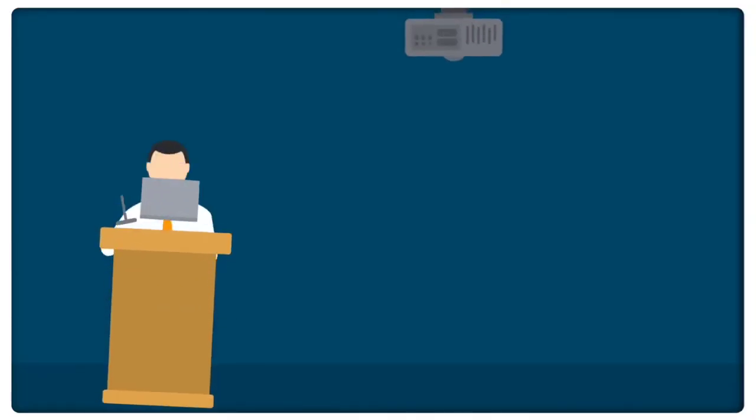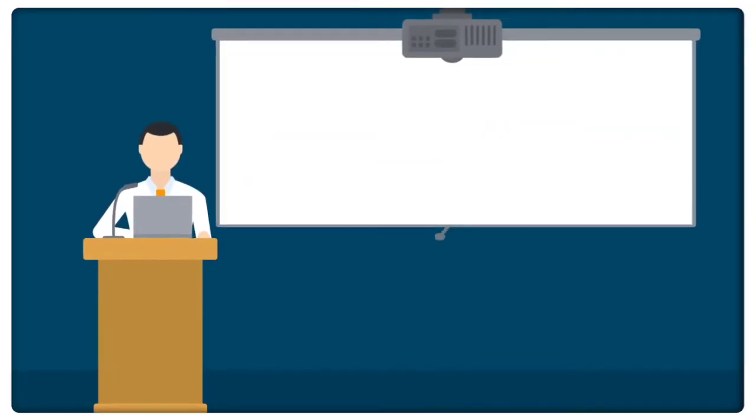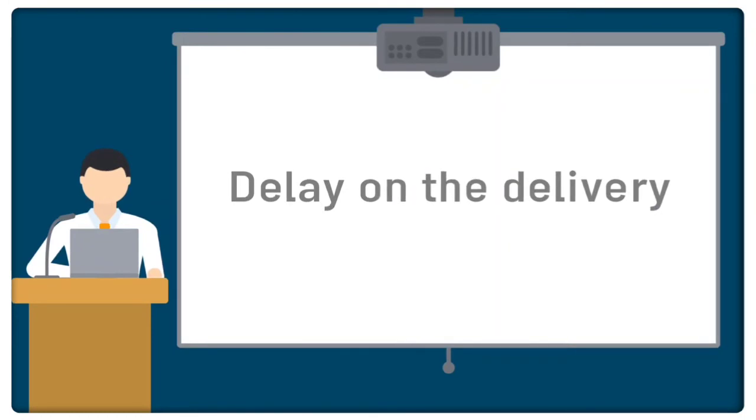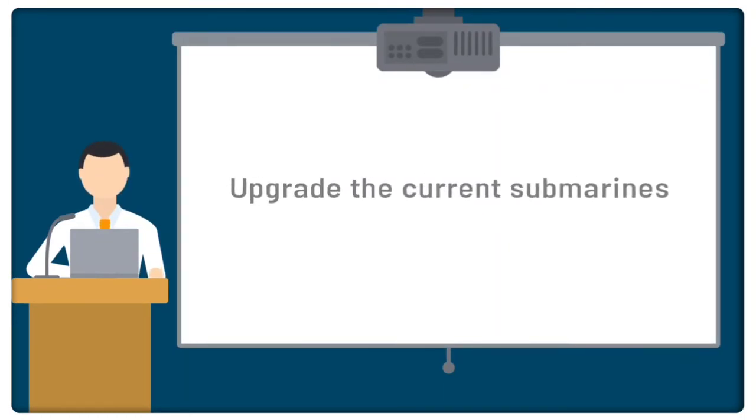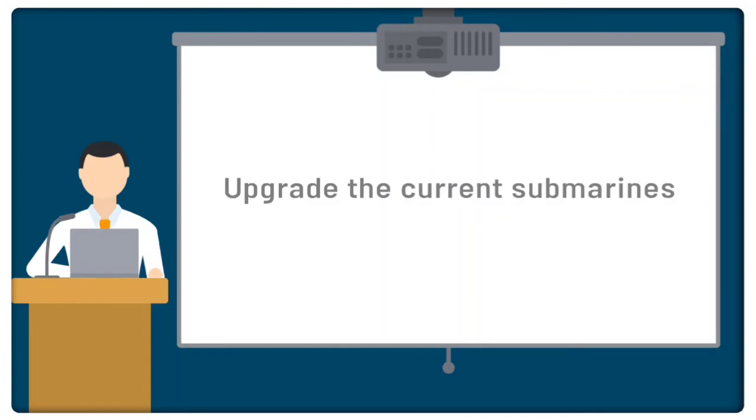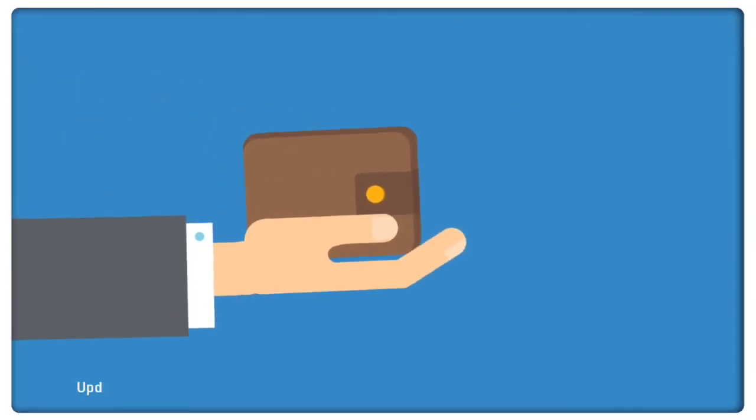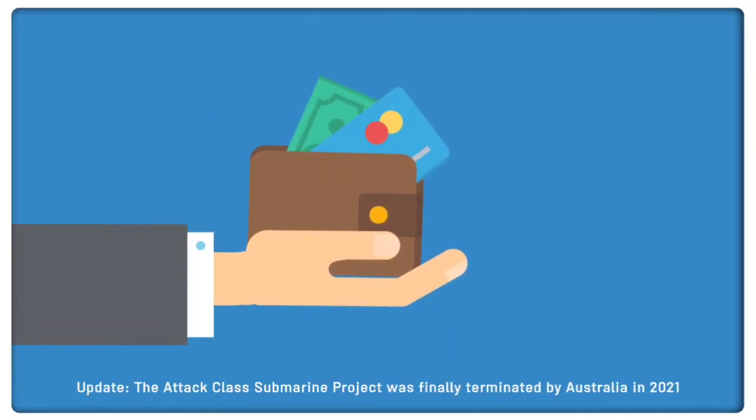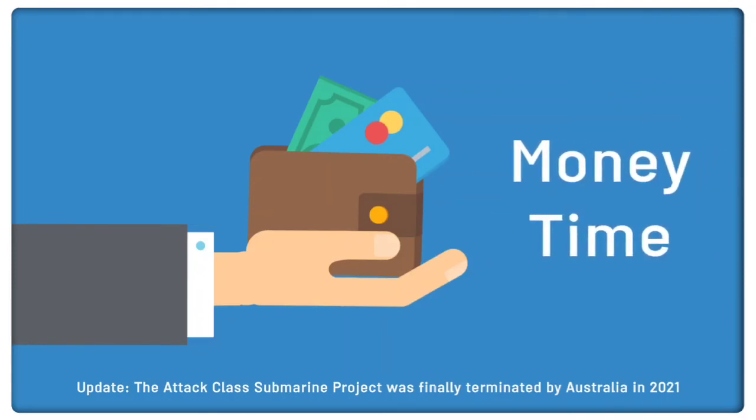If the estimates alerted that this delay in design will impose significant delay on the delivery of the first batch, Australia will then have to decide whether to upgrade the current fleet of Collins-class submarines so that they can stay in service until the new submarines arrive. The upgrade project would be an expensive project itself and would require several years to complete.